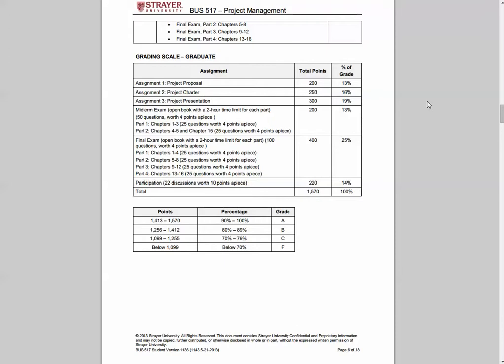Doesn't the project management framework first begin with maybe a simple scope statement and the project charter? Well, that is a legitimate question to ask. It does look like these assignments have kind of a chicken and egg relationship with each other. The charter normally comes first. Then you have a scope statement that's associated with the charter.